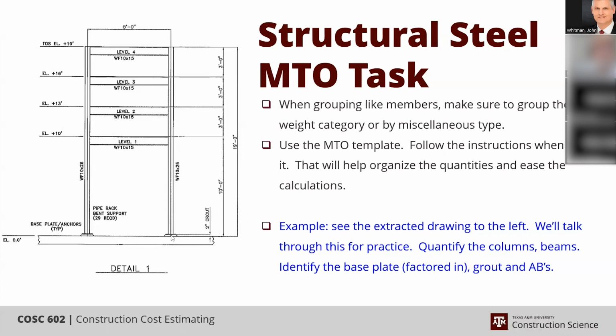It would be basically 2 inches divided by 12 times 26 divided by 2,000. It becomes insignificant. You could even count it as part of your waste allowance or design allowance if you wanted to. If you want to be extremely particular, you can go ahead and subtract it.